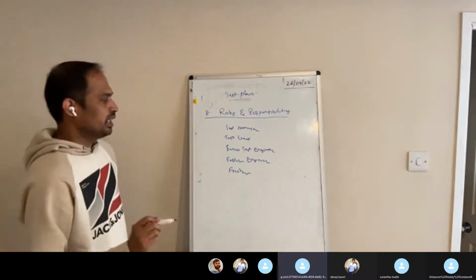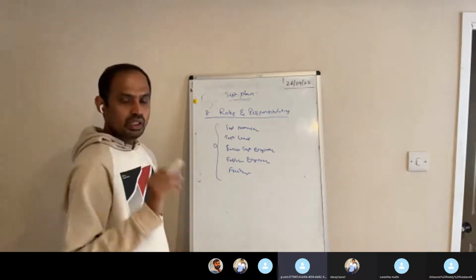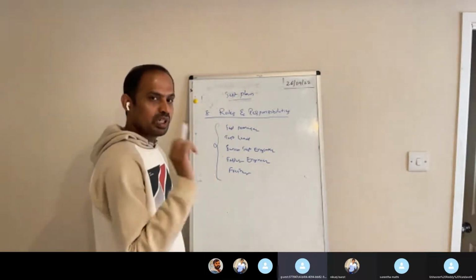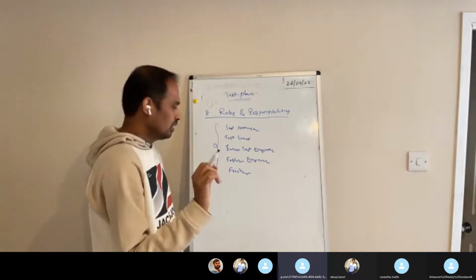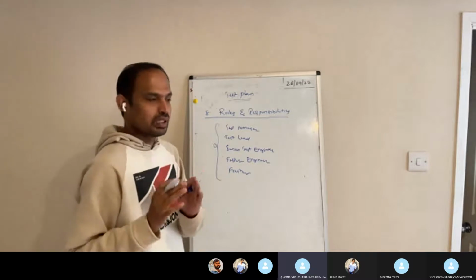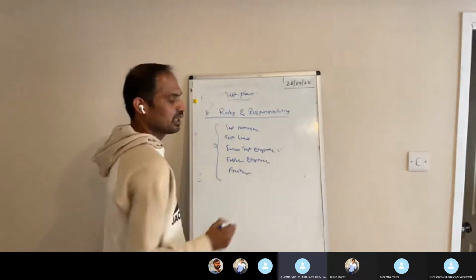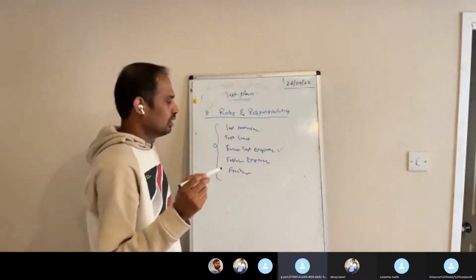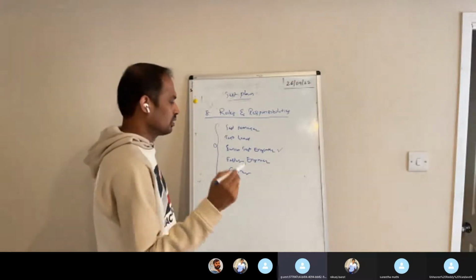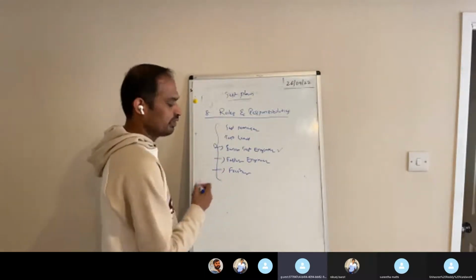So every team will be divided like this. In each and every team, there will be one experienced person, one medium, and one fresher. They'll split the team in such a way that there is no need to keep all senior test engineers, because that will increase the cost of the project. So one senior test engineer, one middle level, and one fresher.